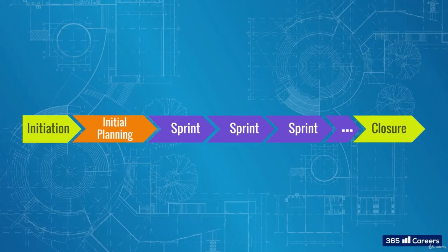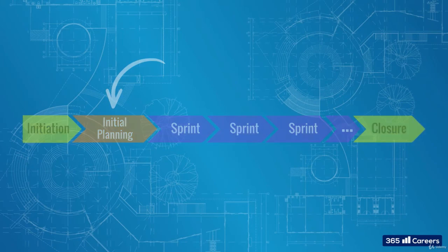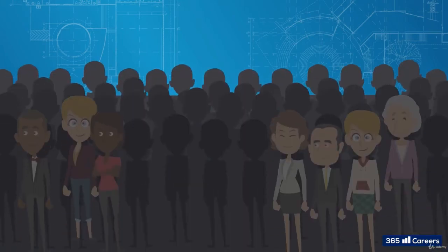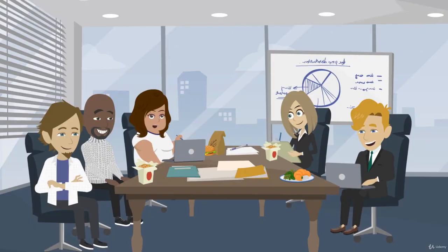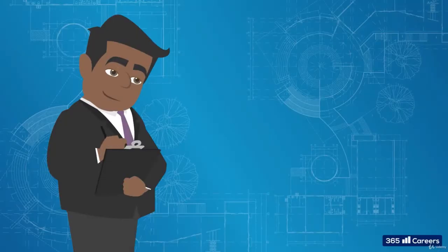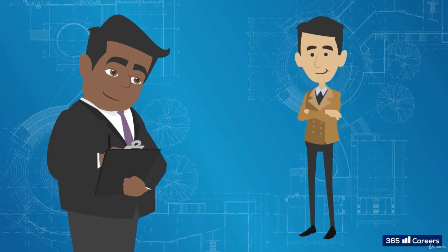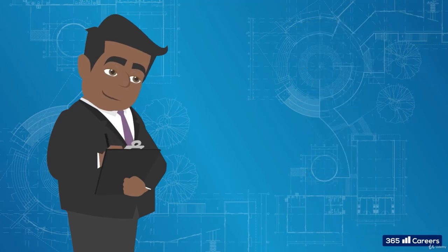The process of gathering, discussing, and documenting them begins during the initial planning activities. It can happen in different ways. For example, the future users, or if the group is too big, e.g., consumers in a given market, representatives of these users are invited to workshop sessions, where they brainstorm together and generate the user stories. Another possible scenario is having user stories provided by the so-called product owner, or the person in charge of the product scope in a Scrum project. We will get back to this role a bit later.